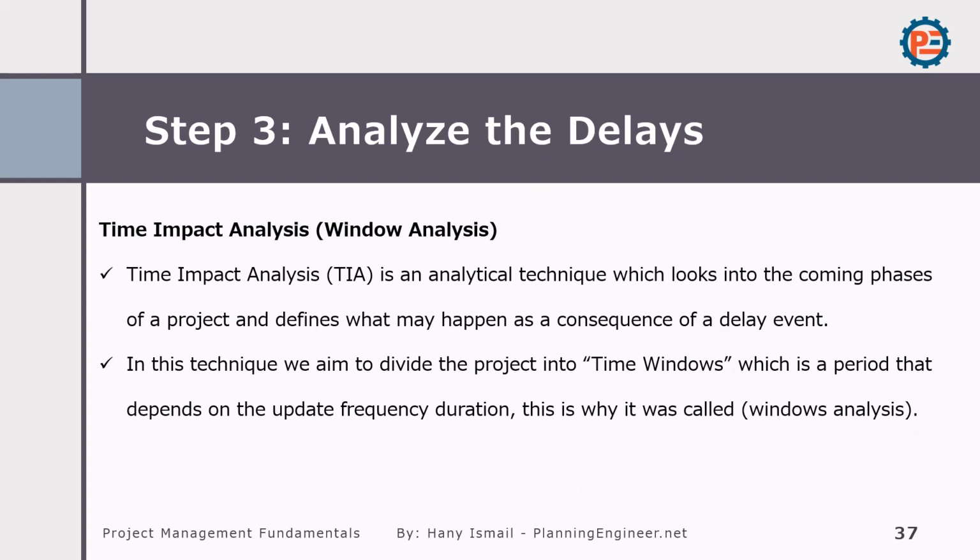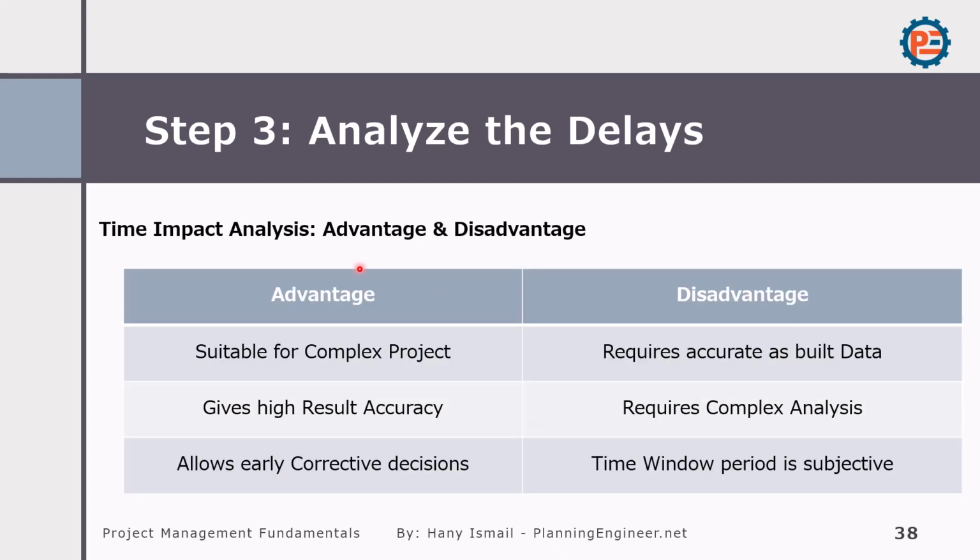This method has some advantages and disadvantages as well. It is suitable for complex projects, gives high result accuracy, allows early corrective decisions. The disadvantages: it requires accurate as-built data because you need to have updated schedules to compare to, requires complex analysis, and the time window period is subjective.